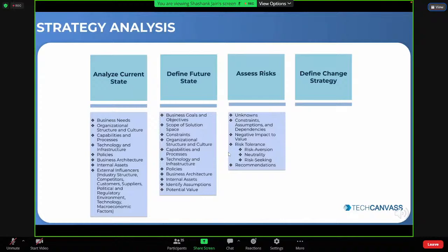The key stakeholders you might think about reaching out to in order to assess that risk: one of the important stakeholders here is the domain subject matter expert, because they have expertise in that domain. You can also reach out to implementation subject matter experts. Assessment of the risk can also be done with people in operational support, because they support day-to-day activities and know the possible risks. Sponsors as well, because you have to tell them these are the possible risks, and to mitigate them, some authorizations or fundings may be required. So to deal with those risks, you need to know which stakeholders need to be consulted.